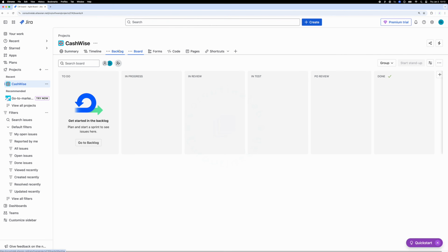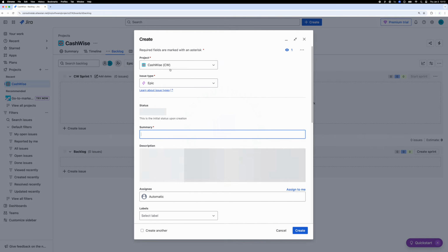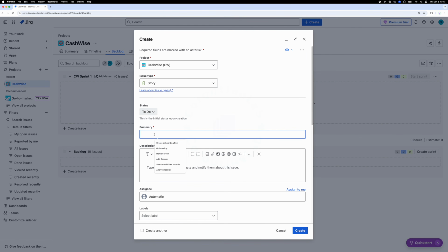Now let's create a few user stories and see how we can link them to an epic. To get started, click on the Create button at the top of the JIRA dashboard. This time, for the issue type, select User Story. Let's create a story to set up Spotless in the project. Enter the relevant details, such as the summary and description, and then click on the Create button. Once the story is created, we can repeat this process to create the rest of the user stories quickly.